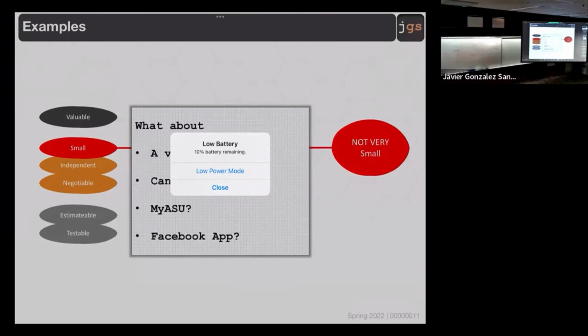Yes. The only thing that you need to be careful about is that sometimes one functionality is not one requirement, because it could be too big, and you need to split that functionality into several things that are going to be requirements. When you look at a verb, yes, it's a verb, it's going to be a functionality, but you need to think about the size. Too big, you need to cut, because requirements should be small.